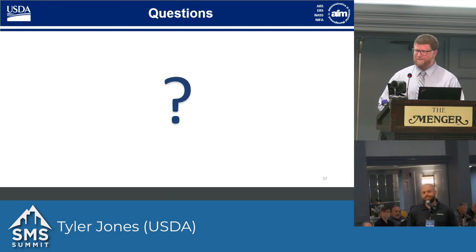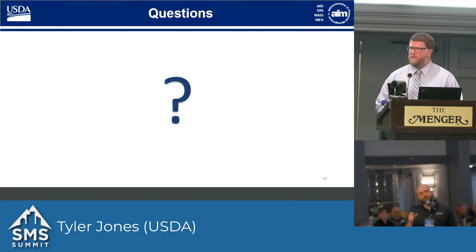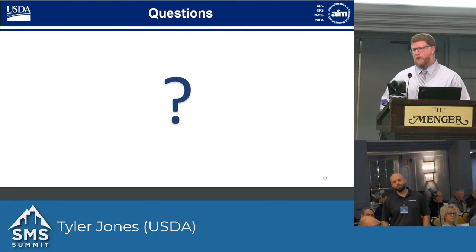Hey, great job. Thank you. Yeah. Question about the 3-year escalation numbers. So how did you come up with whatever you wanted to apply to the factor to be able to come up with those 3-year escalation numbers? So we use Engineering News Record, which all of our engineering project managers have access to, to determine escalation factors, and we use their projected numbers for that.